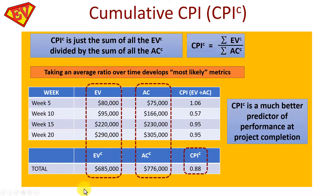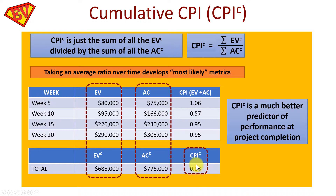Adding up all the Earned Values gives 685,000, and all the Actual Costs gives 776,000. Cumulative CPI = 685,000 ÷ 776,000 = 0.88. You could also average the individual period CPIs — dividing by four here gives the same result. Taking an average over time gives more reliable metrics than using a short period where CPI might be unusually high or low and could change within the next month.